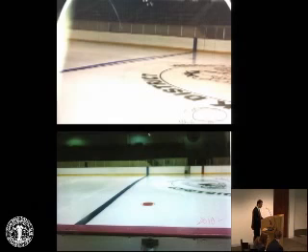In addition, the reheat coil on the slab under the ice has not worked in over 10 years, resulting in permafrost in the soil under the concrete. This condition has caused the rink surface to heave and has produced a noticeable bump, you can see it in these photos, in the skating rink, making it very difficult to maintain. The scope of this project focuses on the total replacement of the ice rink, including excavation and replacement of subsoil and the heating system, new concrete flooring system, as well as the above-ground skate rink components.